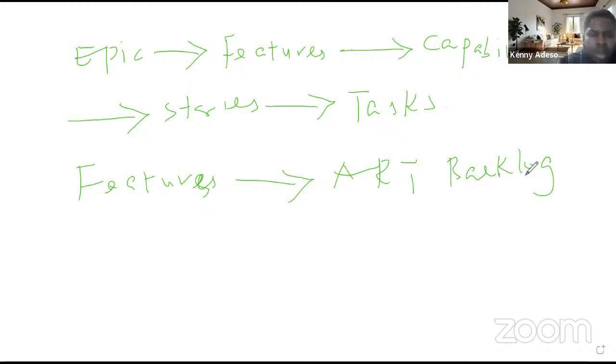All right. These same features breaks down into capabilities. All right. Capabilities, please put this down. Capabilities, they are related features. So let's say there's a feature that we want to build. Let's look at the car, for example, at the vehicle, right? Vehicle has the outside part, they have inside part, right? So we can club together all the features for the outside part of the car to be a capability. Okay? Can put the features that are internal to the car to be a capability. All right? Then this capability will now break down into features. Let me put it that way.